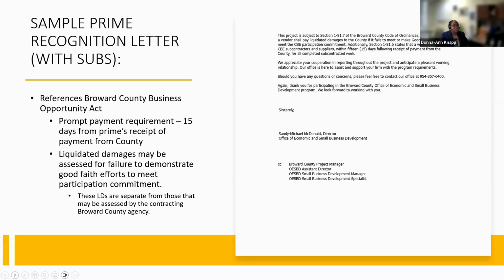Now, these liquidated damages, or LDs, are not the same LDs that the Broward County project manager can assess for delays in performance and time. These are separate, so it is possible under a contract to have two different sets of LDs. These, however, are authorized by the Business Opportunity Act, so we're making you aware of it. However, it's not just assigned or assessed willy-nilly. There has to be a reason that it is assessed. And we work with you throughout the project. So the idea is never to get to the point where you haven't made efforts to either become compliant based on our correspondence with you, or demonstrate that you genuinely have made efforts to meet your commitment.